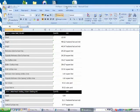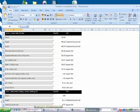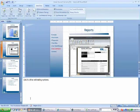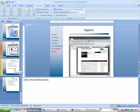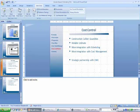We basically started with model-based quantities. We linked those model-based quantities to line items in our estimate. In our estimate, we were able to track changes and highlight where different cost items are over target. And then we were able to create a report and export the information into other estimating systems as well.